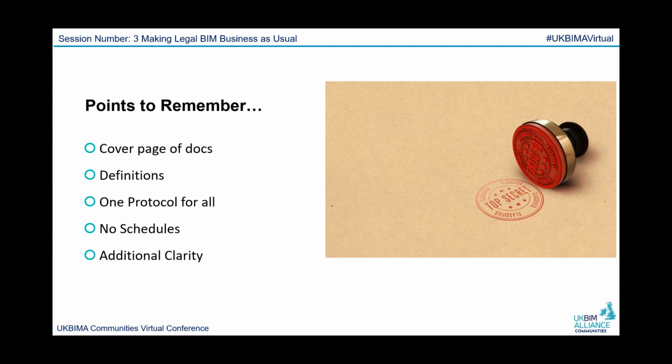So one of the things we did is try to make it as user-friendly as possible. We're taking lessons learned from how people were using or not using the CIC BIM protocol to date. So as a result, we've taken out all the schedules. One of the reasons being in the various studies done about the protocol, it was found generally people weren't filling in the schedules or were filling them in incorrectly, which resulted in issues as to the legal enforceability of the protocol.